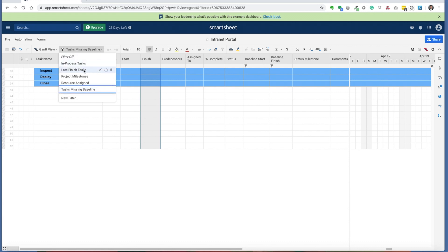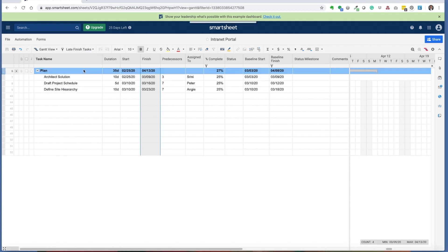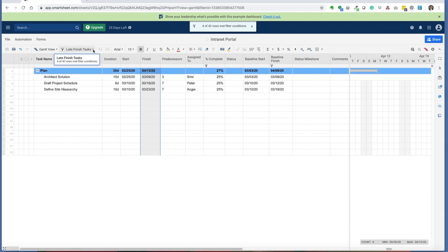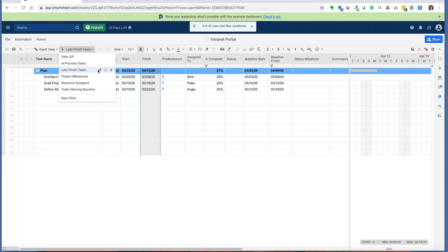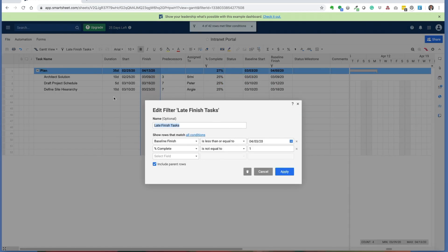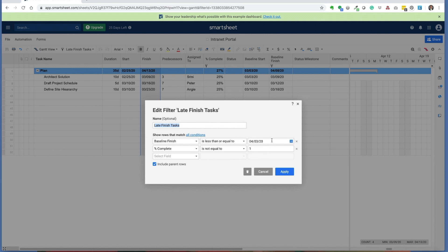Once that's done, you can run the late finish tasks filter. The way this filter has been built is it looks at the baseline finish date and tries to determine what are all the tasks that should have finished by a given date and where the percent complete is not equal to one or 100%. In this case, I'm looking for all the tasks that should have been completed by April 3rd where the percent complete is not equal to one, and it identifies all the different tasks you see above.